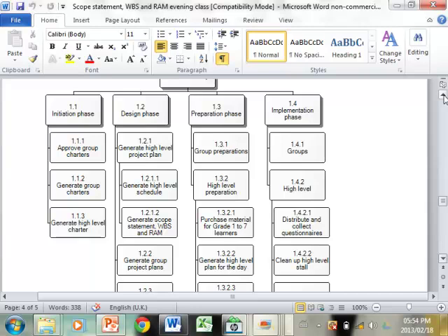All right? Yes. I thought the first thing in the brainstorming session, taking for example how to make a cup of tea, we sit down and someone says get sugar, get whatever, we put everything together. So now we categorize the activities that are there. But the first thing, maybe you have to get water before you boil water, or first ensure that there is electricity. Get water, boil water, get sugar and everything, so that it follows the logical sequence. No, in a work breakdown structure, all it tells you is what is the work that has to be done.